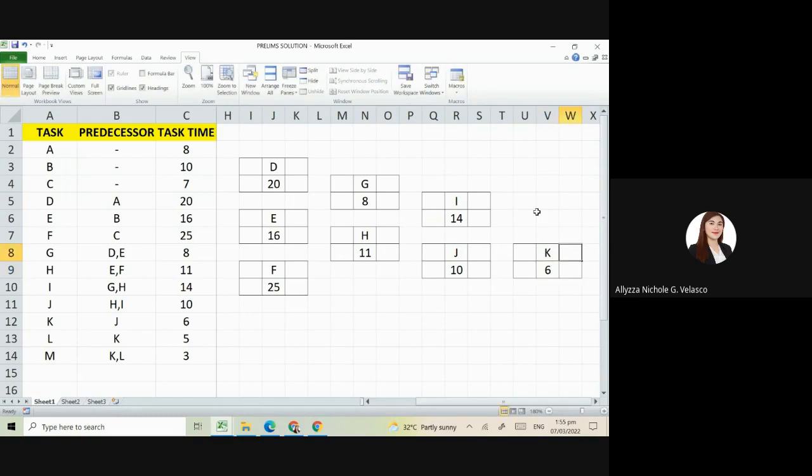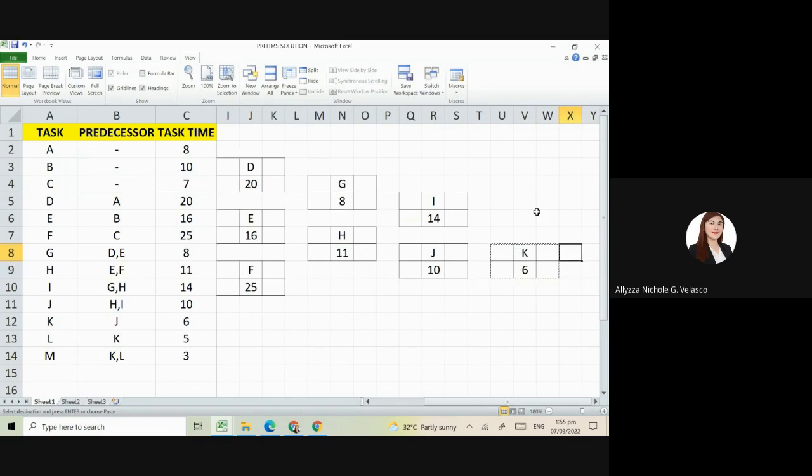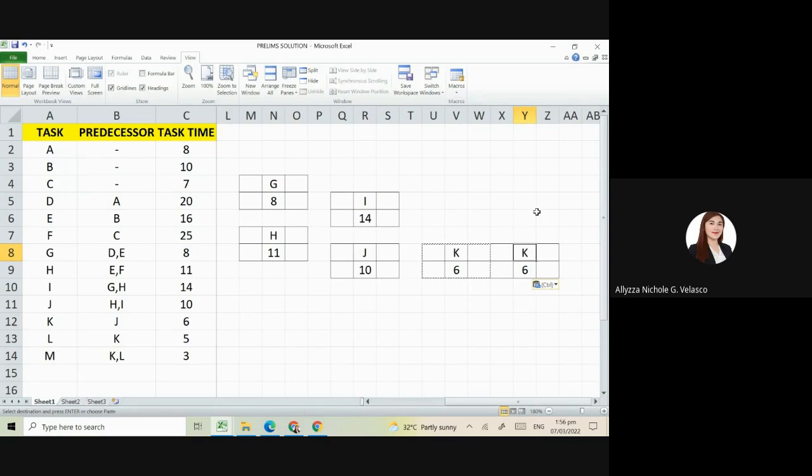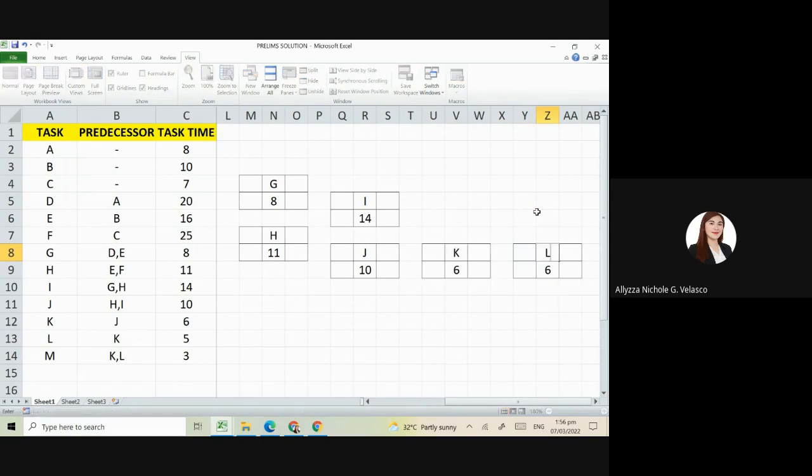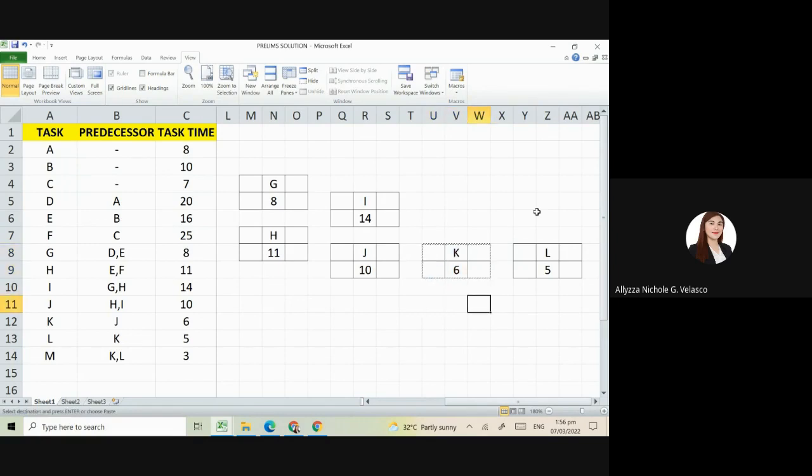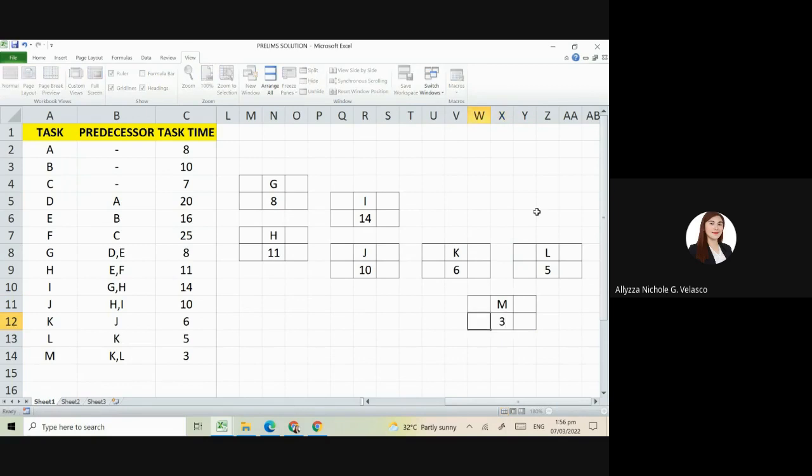Next is L, having 5 days. And our M, its predecessors are K and L. So we'll place it here near K and L, having 3 days.